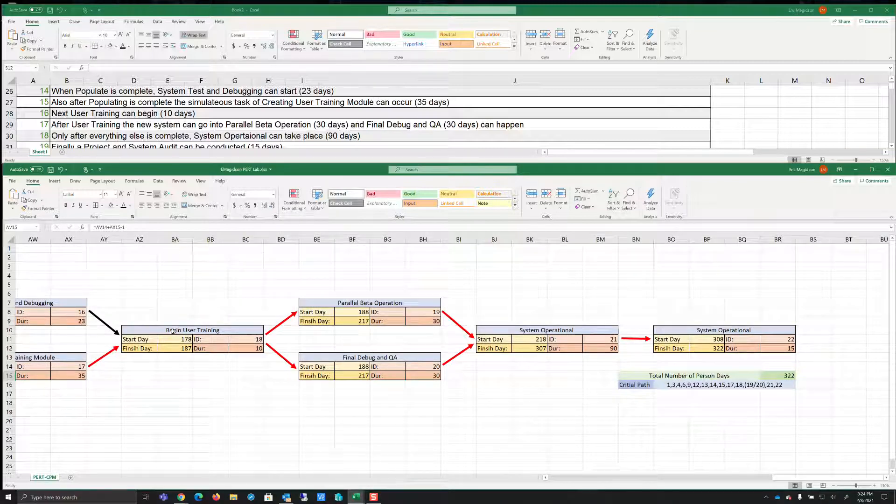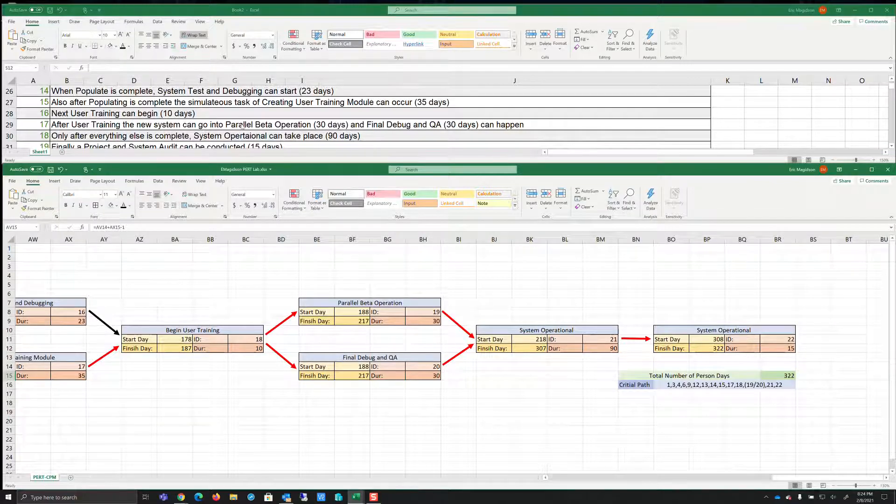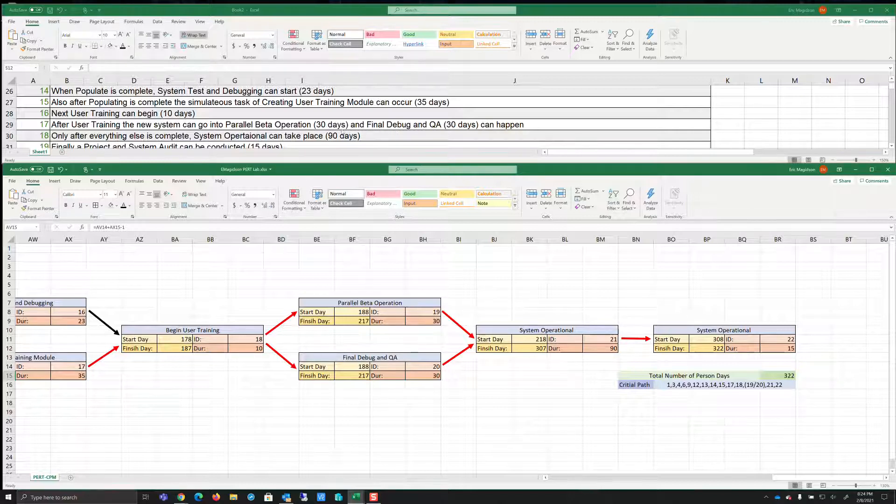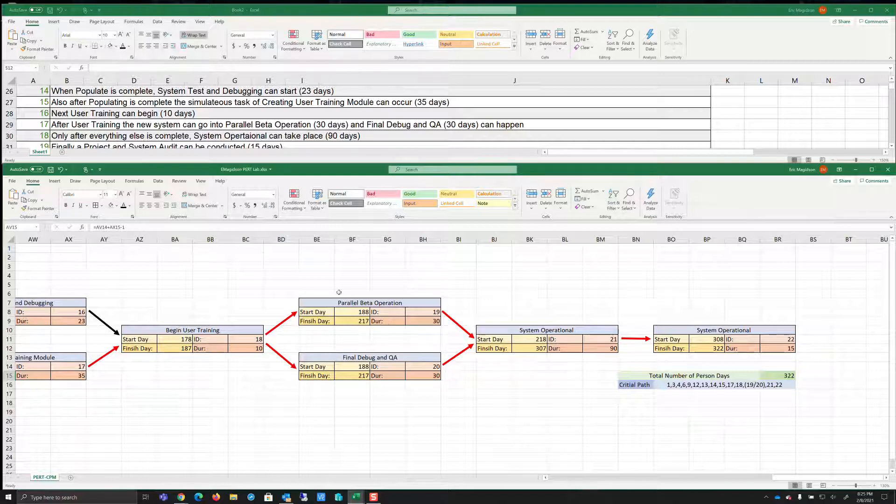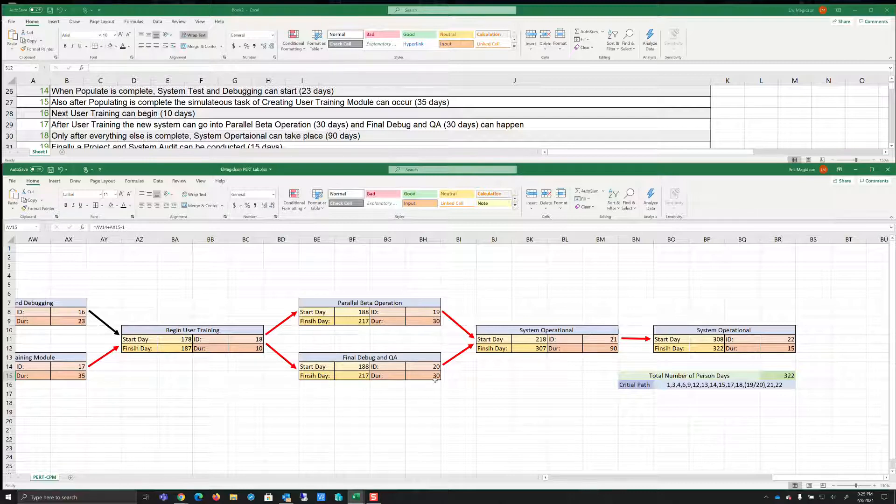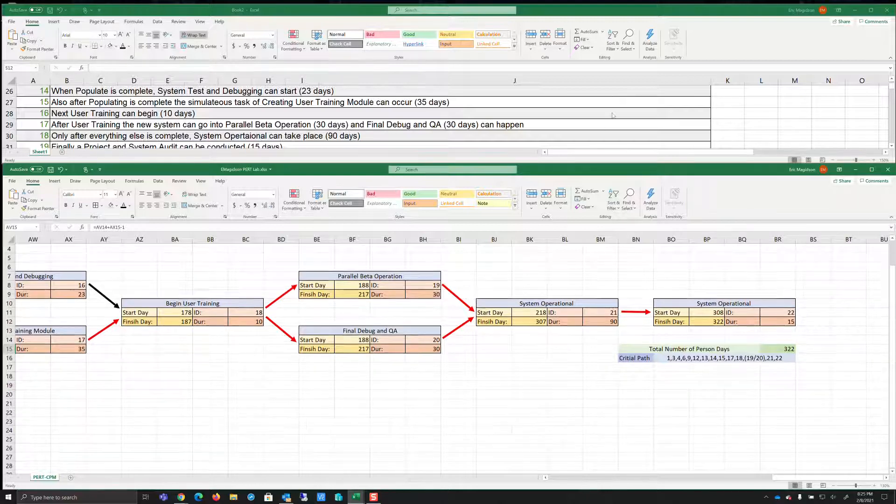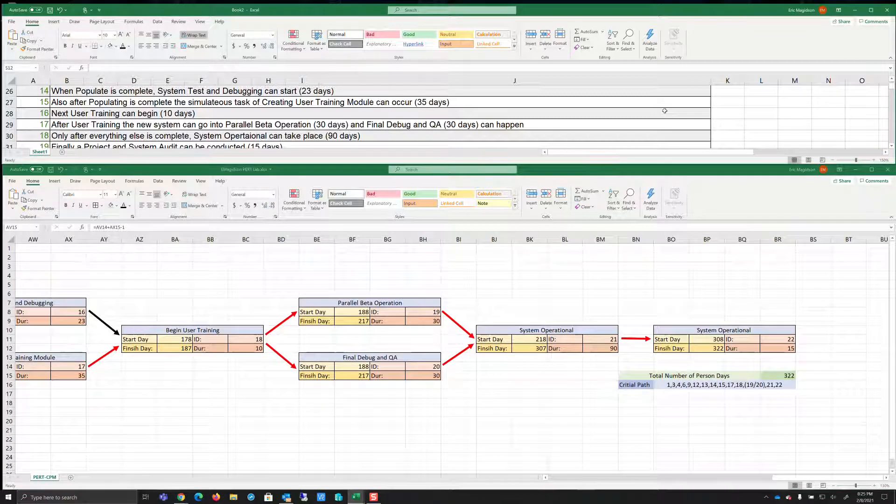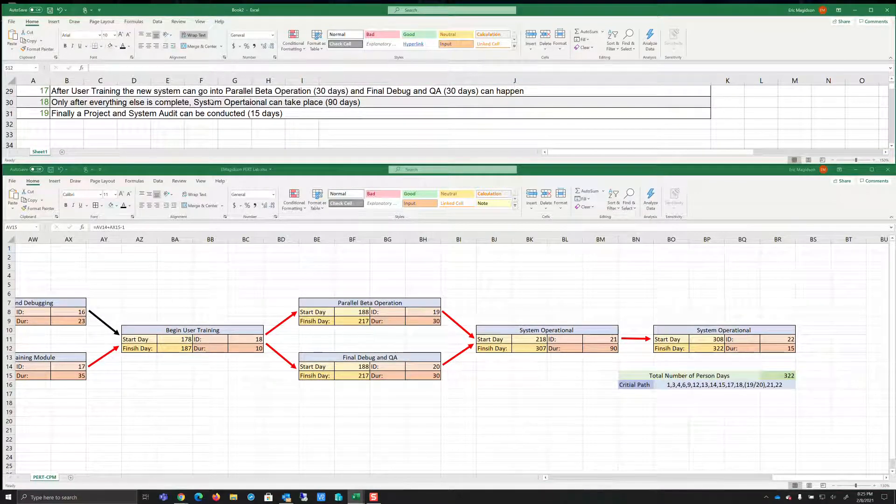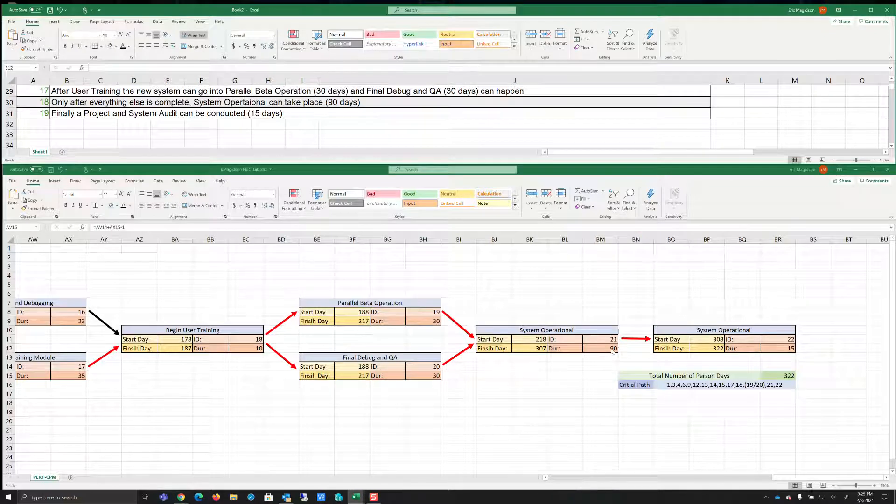So once begin user training takes place after user training, the new system can go into parallel beta operation and final debug. Now notice this time, because it's listed as two, I listed it as two tasks. And I almost prefer this than having one task with multiple, one task box with multiple tasks. But notice either of these can be our critical path because they're exactly the same days. So we note that notice here 19 and 20, it can be 19 or 20. Finally, as we finish off the project, we are going to make the system operational. I should give that a better name of 90 days. And only after those 90 days, can we finalize the project and do a system audit.